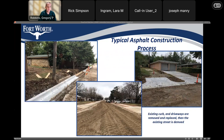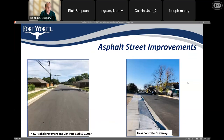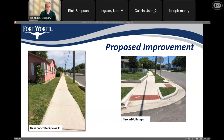If your street is being replaced with asphalt, the existing curbs will be replaced along with the existing driveways first, then the street itself will be demolished and the paving replaced. Here's an example of what you can expect the new concrete streets to look like when finished. We will also be installing new concrete sidewalks in many areas along with new wheelchair ramps at intersections — here's a picture of what those will look like when completed.